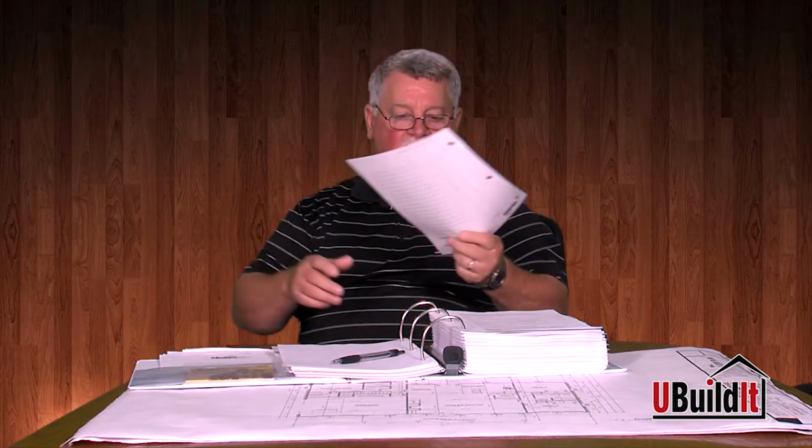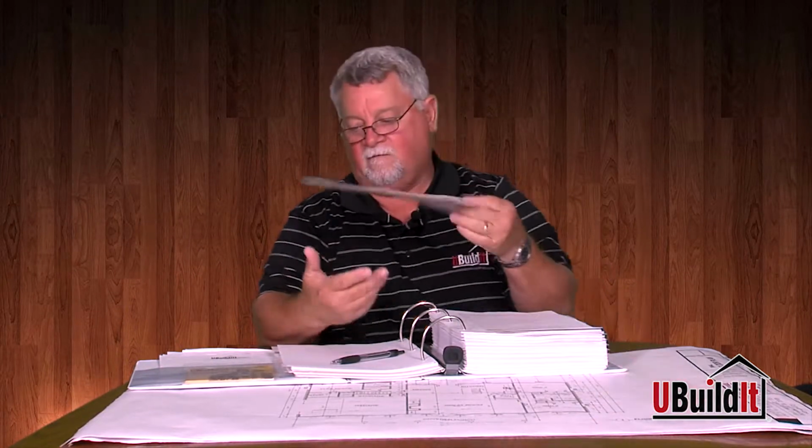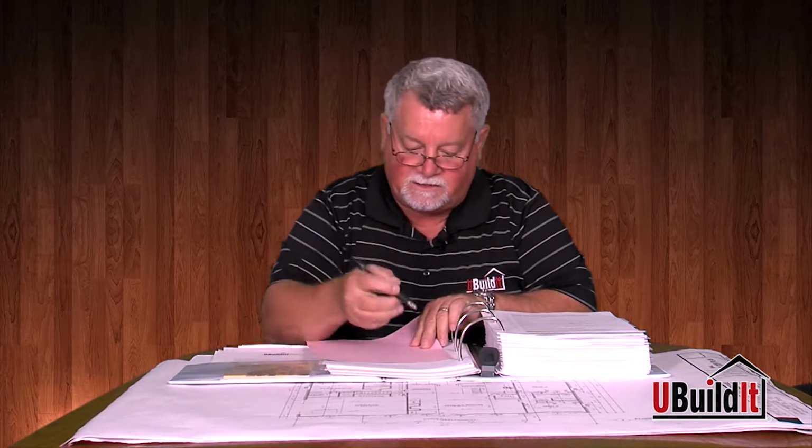And then he's going to bring it back and hand it to you and say, okay, I need you to sign right here and I need 50% of your money. At that time, I like to say, wait a second, let's see what you have here. Okay, and I like to go around the deal. This window right here is the 4050 single hung, and I like to put a number by it, number them, number one. I want to be sure that window matches what actually says on the plans right there.